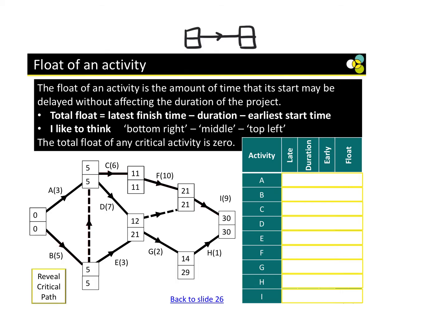You remember earlier we had that question where we had to work out X, Y, Z, and W. Sometimes we might only have part of a graph, and the way we work it out is by using this formula. Okay? So a critical activity has a float of 0. And how do we work out our total float? So the latest finishing time, so we go backwards.